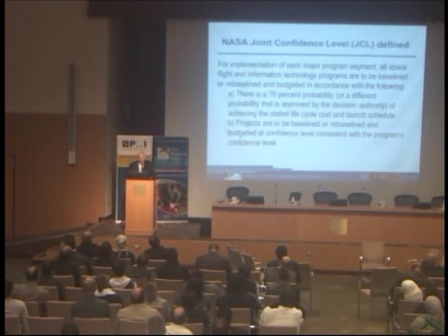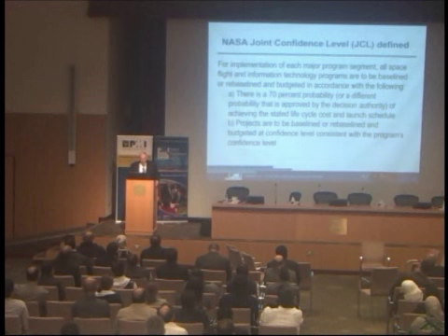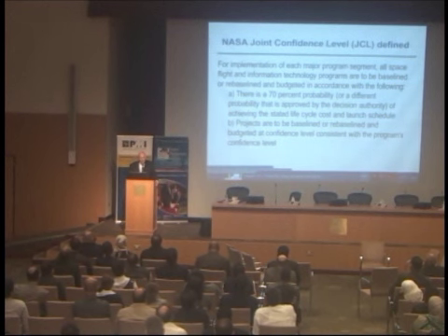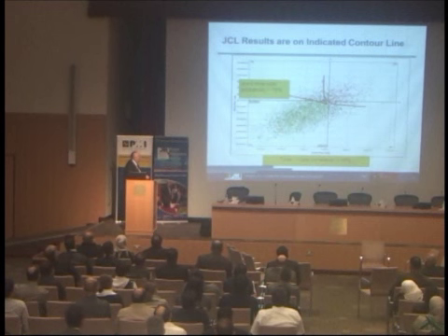Okay, well, NASA, the National Aeronautics and Space Administration in the United States, actually mandates this requirement, that you budget to a date, and you budget to a cost and schedule to a date where there's 70% likelihood of meeting both targets. And they require that at 2 of their key decision points, this is done for their projects. And here's a picture of that. This is 70% likely, which means that 70% of all the dots are in the southwest quadrant.